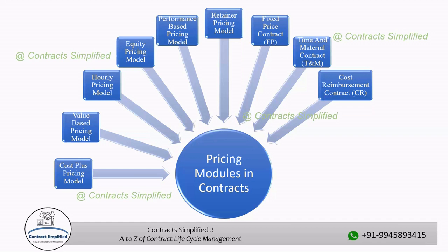In this type of contract, the contractor is reimbursed for allowable cost and is also paid a predetermined fixed fee as profit. This fee does not vary based on the actual cost incurred, providing the contractor with a set level of profit. Cost plus incentive fee contract. In this contract, the contractor's fee is determined based on the cost incurred and performance against certain predetermined performance targets or metrics. If the contractor meets or exceeds these targets, they can earn a higher fee than initially agreed upon.